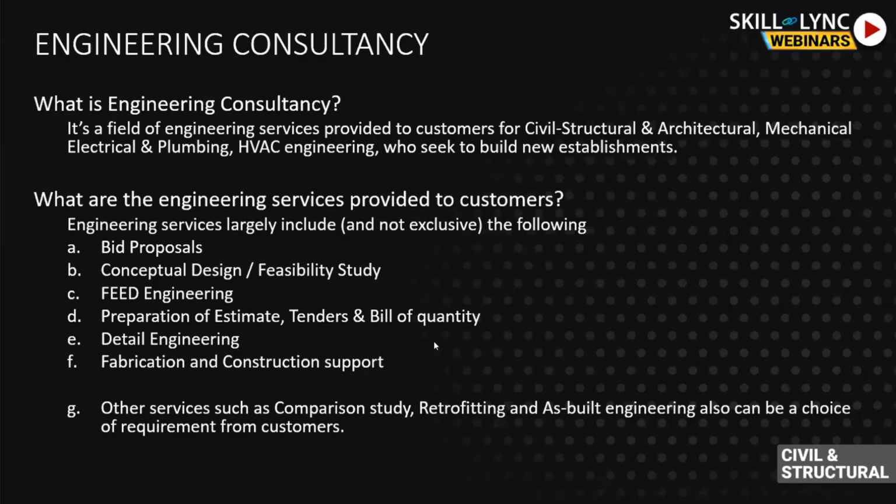Those sort of services come under the second phase of this point, number D, which is the tenders. You release these tenders to include these sort of third-party vendors. So once these PEB vendors come on board, they would require a design for the foundation of this superstructure, or the steel structure that they could provide us.